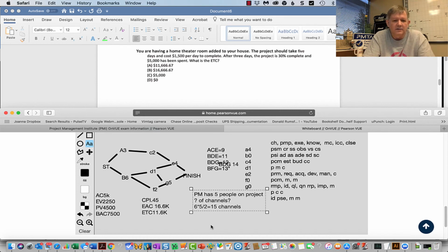How's that? Now, you were worried about how do I use this dry erase board. So we got a process table, we got a network diagram using text boxes and lines, and this is just one big text box in an earlier video. We got a text box here with paths and duration. We got the slack for each task. We've got the adjustment when BDG slipped from 12 days to 14 days, our new critical path.